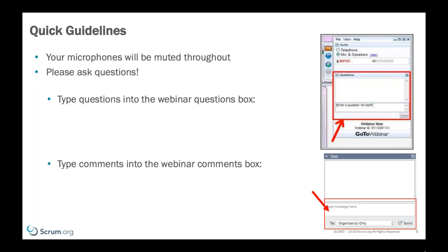That's a really good question. And I think there's a few things that can help there. The first is the sprint itself. You've got a short period of time, usually 2 weeks, where you have a goal, a thing you're trying to achieve in mind. That's the first thing that helps, because then you're not looking at a date that's 18 months away and then procrastinating for 18 months working on the easy stuff or the stuff you want to work on and leaving all the risky, hard stuff till later. You're focused on what's the next most important thing we can do to deliver value.